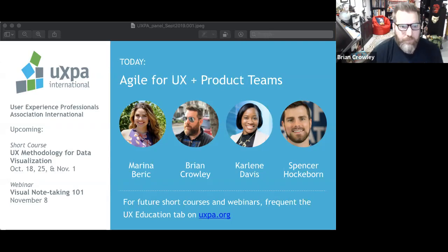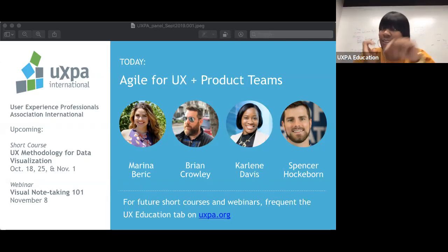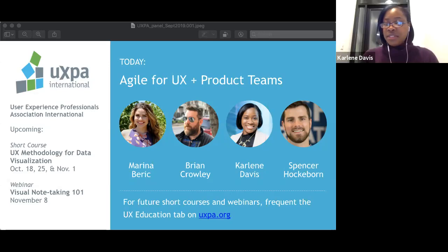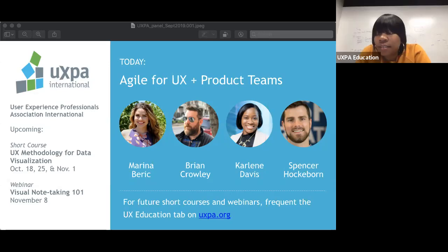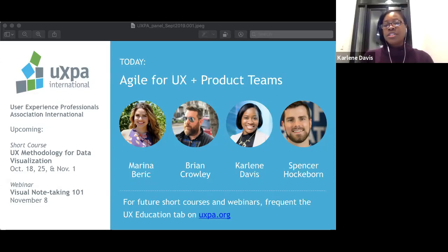And you guys keep saying PI planning. What is PI? What does that mean? A PI is a product increment. So essentially a PI plan is a roadmap. So to tie back to your original question of the process, you'd have this PI plan with, as Marina said, epics. Those are broken down into sprints. Sprints can be 1 week for XP, or 2 weeks for Scrum, or up to 4 weeks. Not prescriptive, based on the organization, based on the team. My sweet spot tends to be 2 weeks. Less overhead with sprint planning and the retros and the demos. Those take time. But PI planning really is your roadmap, and it allows you to organize by sprint.